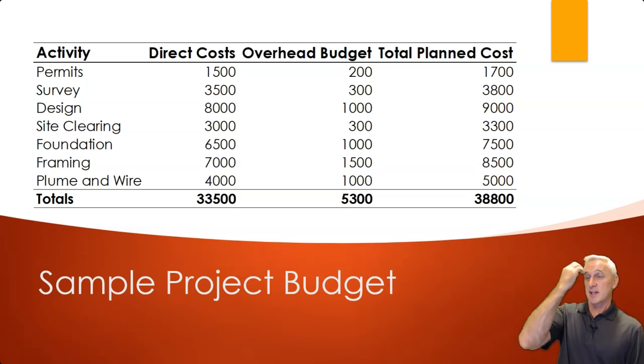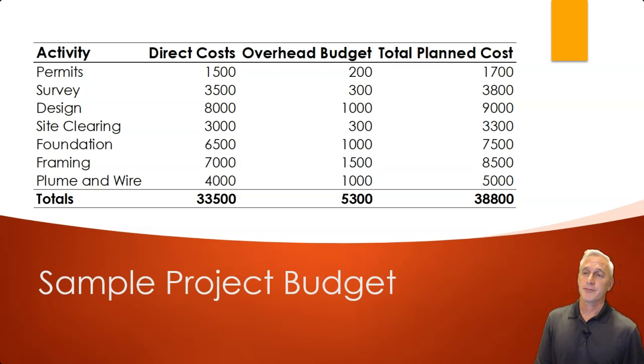So this activity has all these components to it. This could be really subtasked to a larger task or a larger deliverable. We have our direct costs associated with each of these things. Again, these are estimates that you would get in the field. We have our overhead, and notice the overhead doesn't stay the same for everything. Now this is in absolute cost terms, or dollar terms, if we're talking United States dollars, versus percentage terms, so it's not in percents.